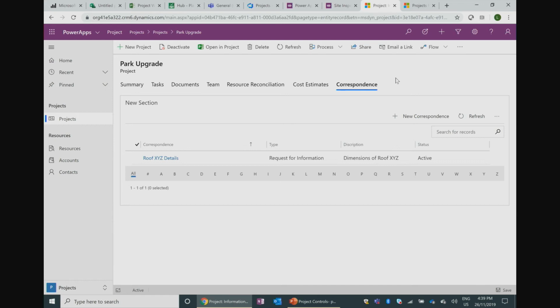Progress payments, for one of our clients, is not an email sent anymore. It's not an Excel sheet that they have to fill out. It's an app. They give them the app and say, you want to deal with me? I'm the owner. If you want your progress payment as a contractor, subcontractor, prime contractor, there's an app. The app will give you a list of the projects that you're working on with me. It will tell you your progress payments in advance, what they are. You then click on them, claim the number. If there is a variation, you put in the variation. It will create your certificate for you in there, and so on and so forth.